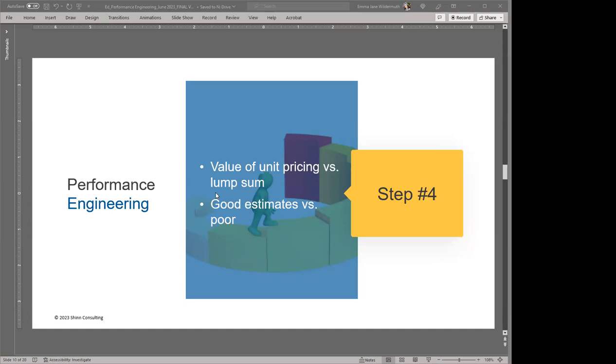I mean, we like to tell people, if you're doing everything turnkey, some of the simplest things you can break out are roofing. You can save $3,000 to $4,000 a house right there with just unitized pricing, you supplying the material and you getting a labor only guy. So you have to know what your costs are. And the only way you do that is with unitized pricing.